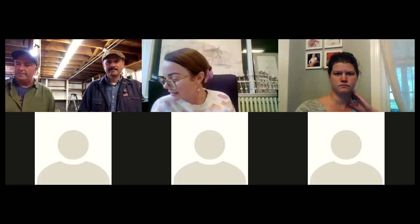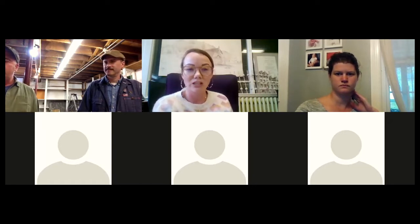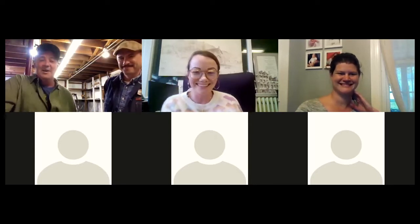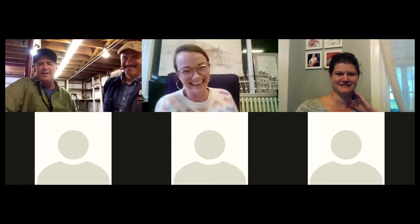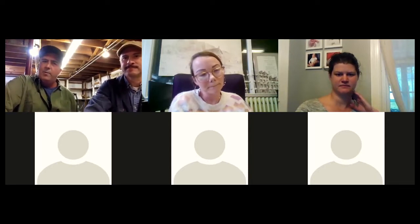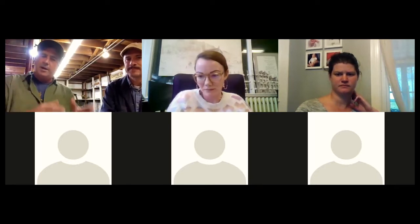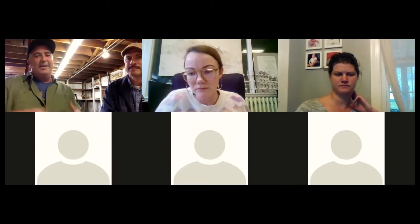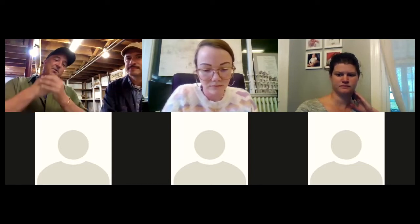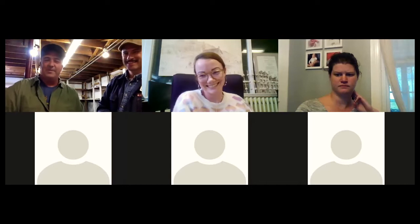Okay, so pop quiz, definitions. What do we think for our panelists? What is an estimate when we're dealing with contractors? Well, I can answer that question. Oh, thank you, Chris. I've written plenty of estimates. Estimate's pretty broad in its sense. After meeting with somebody and you learn about what they want to do, and you've taken the time and you're communicating back and forth and you have an understanding of what they want to do, I prepare what's called a scope of work. In that scope of work, it lists all that we intend to do. And then it turns into a proposal. I present it to you, and then we discuss it some more.